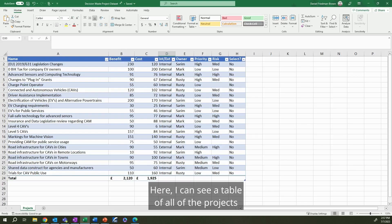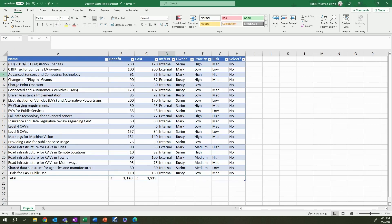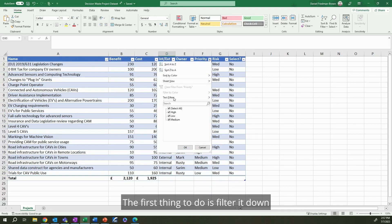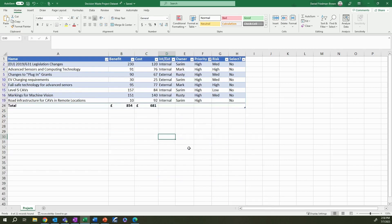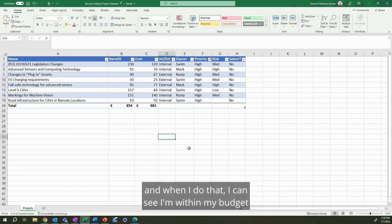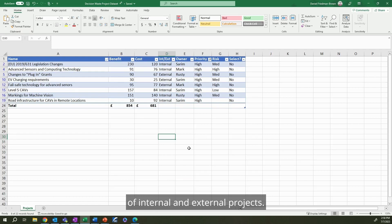These types of decisions are commonly made in an Excel spreadsheet, just as this one. Here, I can see a table of all of the projects in my portfolio with metrics such as benefit, cost, and priority. The first thing to do is filter it down to see my highest priority projects, and when I do that, I can see I'm within my budget of £700,000, and it looks like I roughly have a balance of internal and external projects.